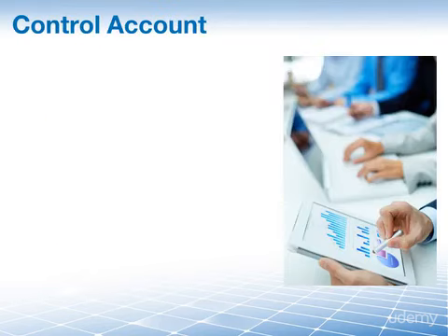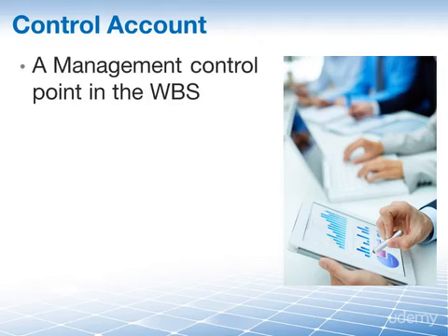Now let's imagine that we have to give a status report on our deliverables. If you have a large project, you will also have a large WBS, and it will probably not make sense to give individual status on the thousands of work packages that you may have contained within the WBS. Instead, you will want to do this at some higher level, at some management control point within your WBS, and you will want to give an aggregate status report.